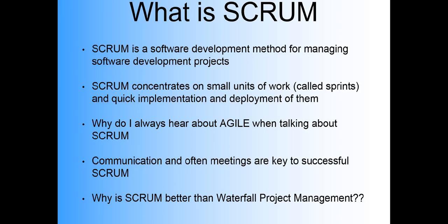Agile eliminates this issue, and with Scrum, there's no such thing as one big project. Instead, project managers and developers are working with small batches of work that are called sprints. Each sprint is considered a full-blown project, and the whole development cycle is being applied to it. This eliminates problems with the waterfall approach, since sprints are much smaller, so making changes to them is a lot less expensive than changing the whole project. Sprints can be as small as a 2-week project, where at the end of it, we'll be ready for end-user testing and deployment.